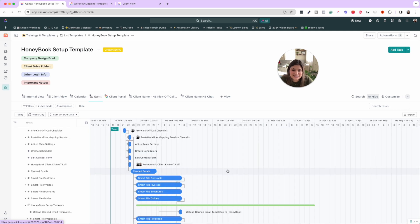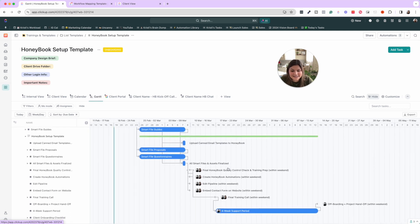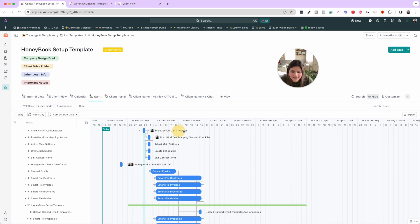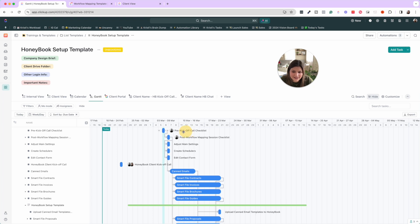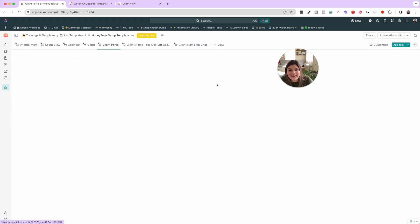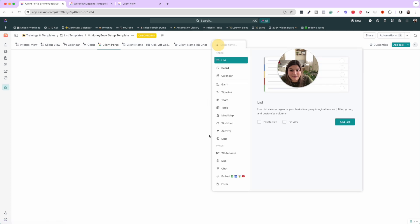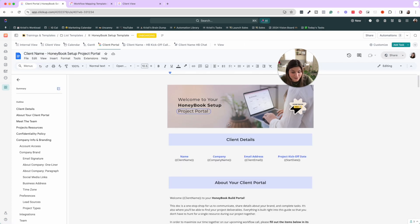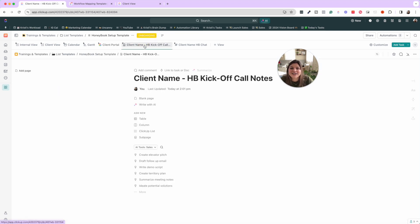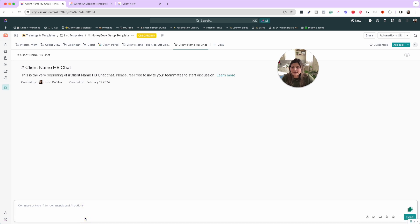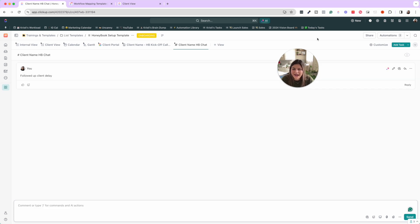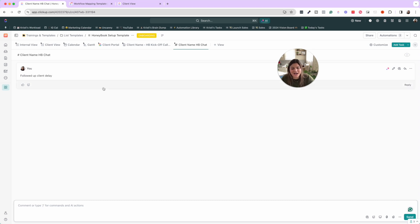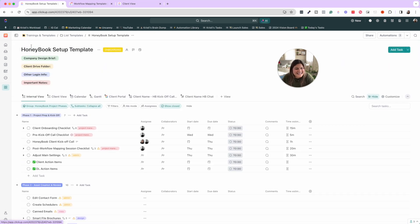Then we have everything in a calendar view. So we could also see it in that way, what's being worked on. We use Gantt view to see dependencies. So if one thing is delaying, say the kickoff call, then it would move everything else forward. Then we link and use an embed view to link the client portal documents. We have easy access within ClickUp. Then we have internal notes. And then lastly, a chat. Now this is internal again, but this is a way that we could be letting the team know, followed up with the client X times and now we are in client delay. And then you can go ahead and just update the team on that. You can add watchers. So anytime you add an update in here, then everyone that's watching this chat gets notified.